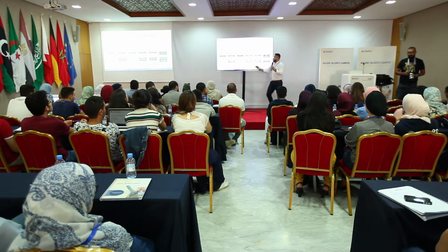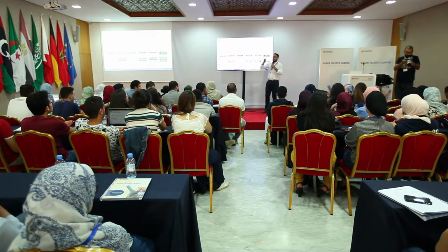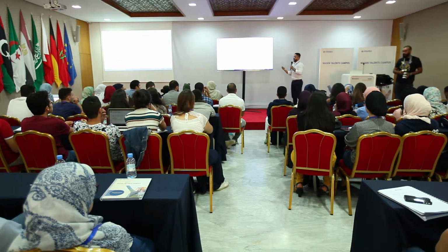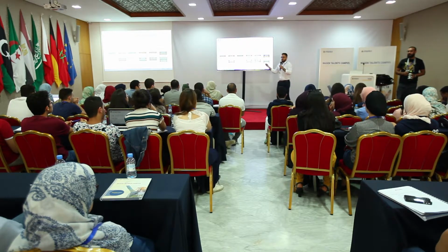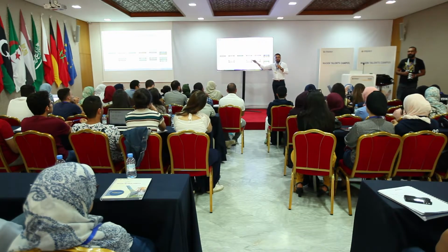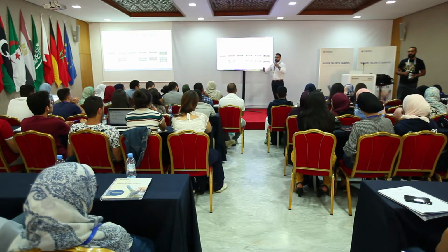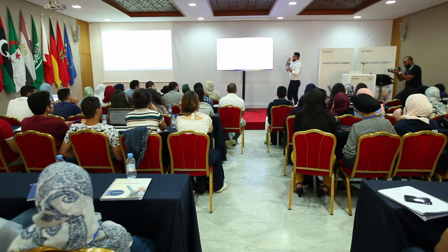Do you need to build a detailed cost model if you're only at the beginning? No. You only need basic assumptions to get something that allows you to estimate if this is interesting for you. But if you are at the very end of the project, then this should be very detailed. The cost model should come from supply offers from real companies, and labor should come from real subcontracted people. Otherwise, it's just assumptions.